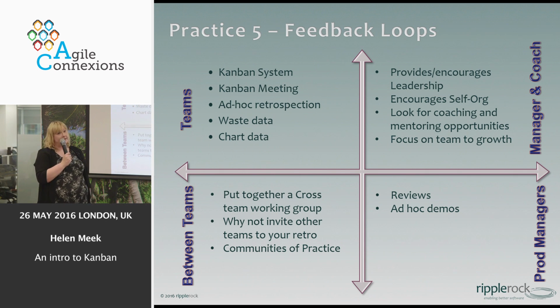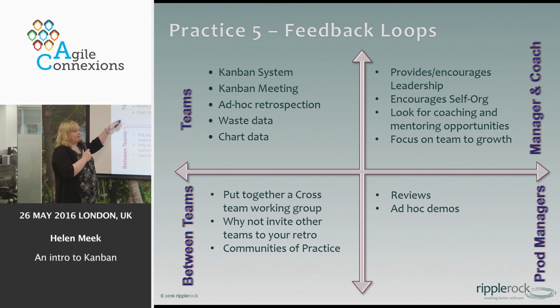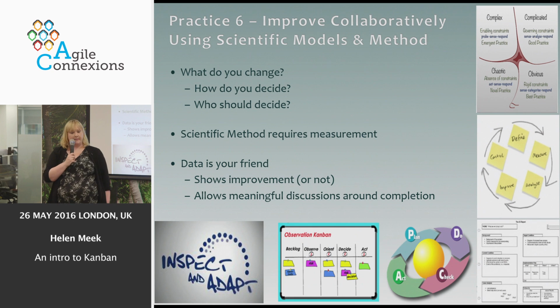Data is also our friend in Kanban. Seek all of this all over the way that you work, collect it up, and then do stuff about it. Make sure you also bank it. There's nothing worse than teams raising lots of things in retrospectives and then us just disregarding them at the end of the hour. Build an improvement backlog. See how that can help you. Flow things through. Tackle the low-hanging fruit yourself. All of these things are going to help improve the lead times of the team.